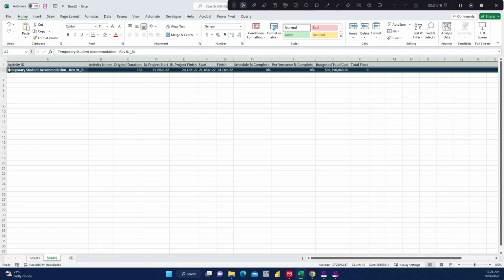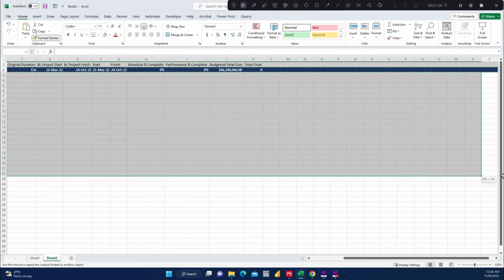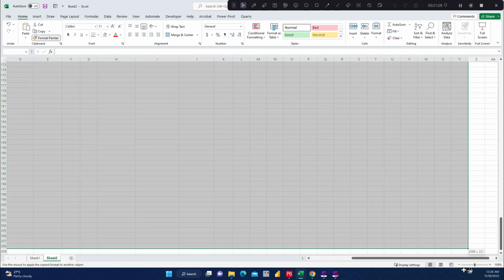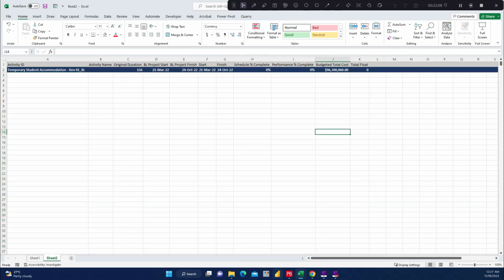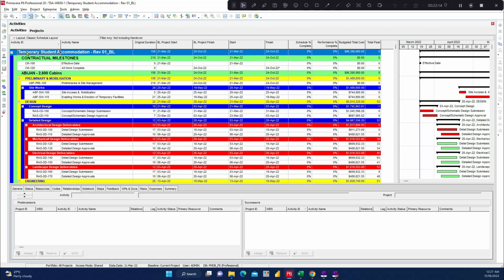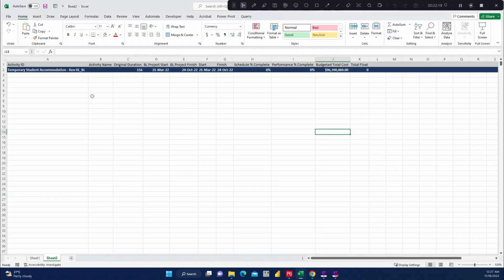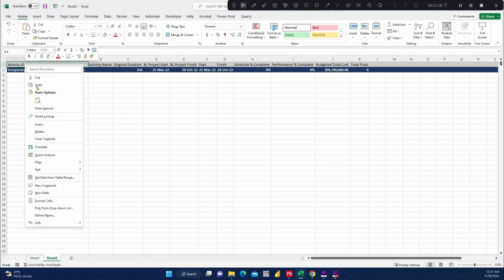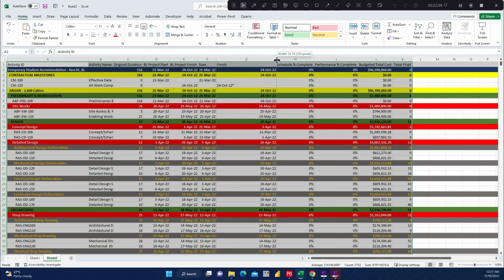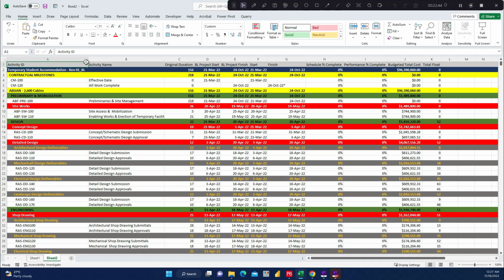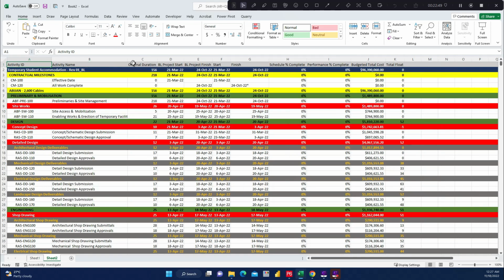Okay, so let's format this row to all other parts of the Excel sheets. So you can take it down to as many rows as you want, depending on your data. And we copy our Primavera, the full activity table, and we'll paste it here, and you'll see the result, and this is what you have. So all of the WBS are colored according to the various groups.